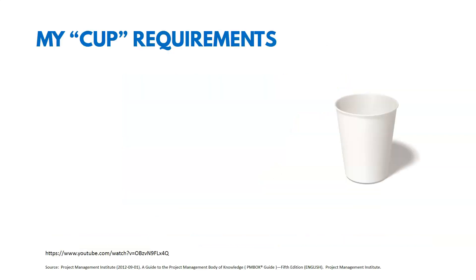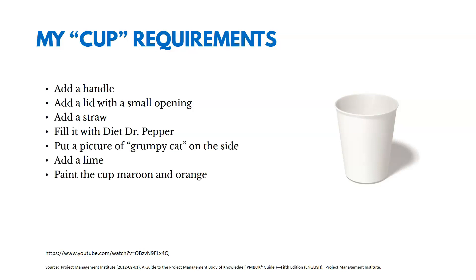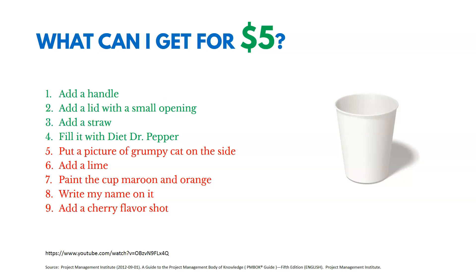Imagine requirements for a cup: add a handle, add a lid with a small opening, add a straw, fill it with Dr. Pepper, put a picture of Grumpy Cat on the side, and so on. The question is — what can I get accomplished for $5? So what would the scope be on a $5 project? Maybe it's just the first four items. We're taking those requirements, collecting them, and then we've got to determine and define our scope.